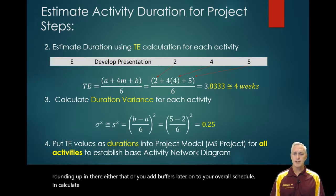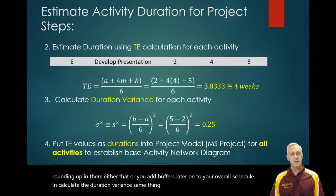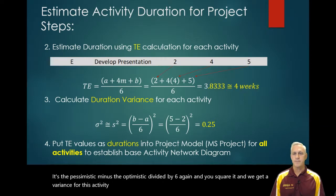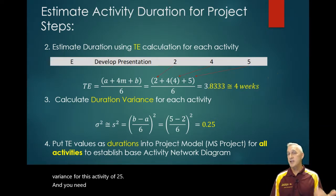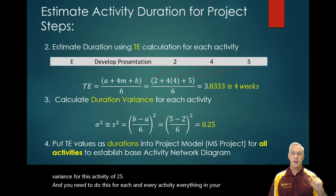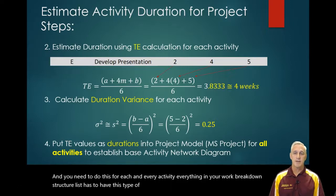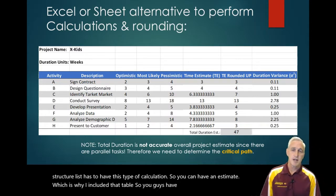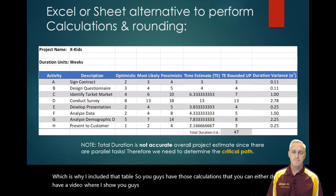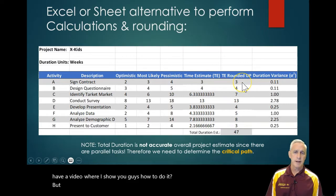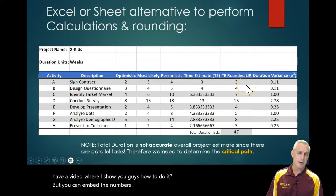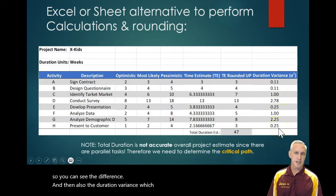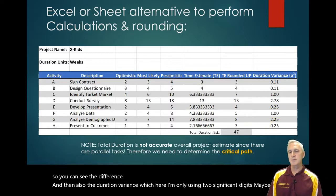You can also calculate the duration variance the same way. It's the pessimistic minus the optimistic divided by six, then you square it. For this activity we get a variance of 0.25. You need to do this for each and every activity — everything in your work breakdown structure list has to have this type of calculation. I've included that table with a roundup column so you can see the difference, and also the duration variance, which here I'm using two significant digits.